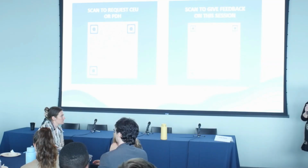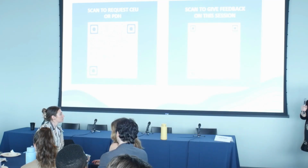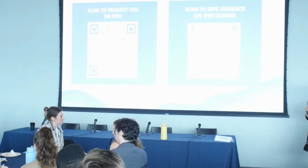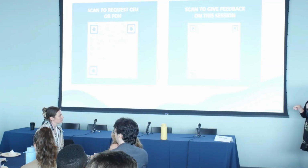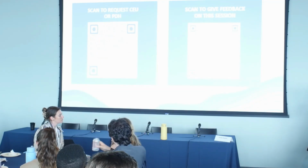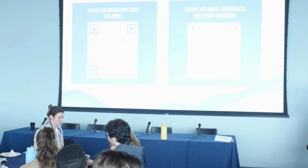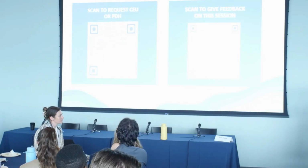I'm sure people are not happy with the way we did outreach on the project. And as part of this Northwest engagement, I think there's been lessons learned where we've tried to do every single type of engagement possible. We've done something we call walk shops. We walk around with people and talk about what's existing and what's coming. We have done area-specific workshops so you can really get into the details of stuff. We've done big public meetings. We've tried to do everything in the hopes that we're getting to as many people as we possibly can, understanding we're still going to be in a place where somebody didn't know about it. But I think it's always a challenge, engagement.